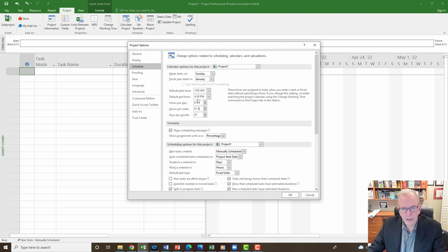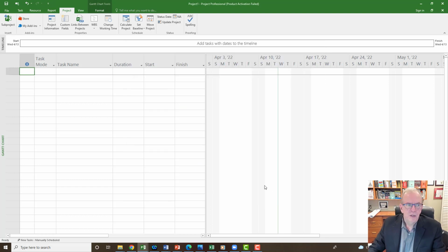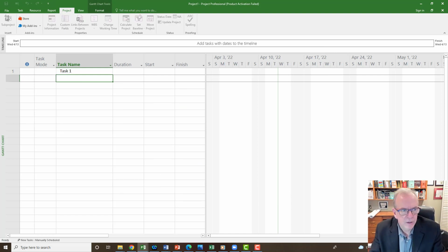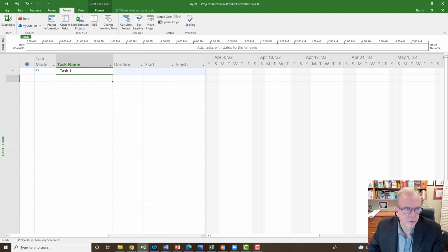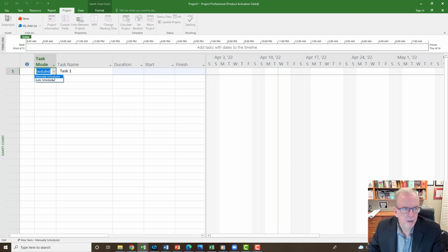But I do have 9.5 hours per day. I've said when we start, I've said when we finish. It adds up to 9.5, and I've got the 47 hours per week. I'm going to click OK. So now they match up. So I'm going to enter a few tasks just so that you can see how it works. And of course, we don't want to have it in manual mode. I want to put it in auto schedule. I'm going to go to the bottom left. I'm going to go to auto schedule.